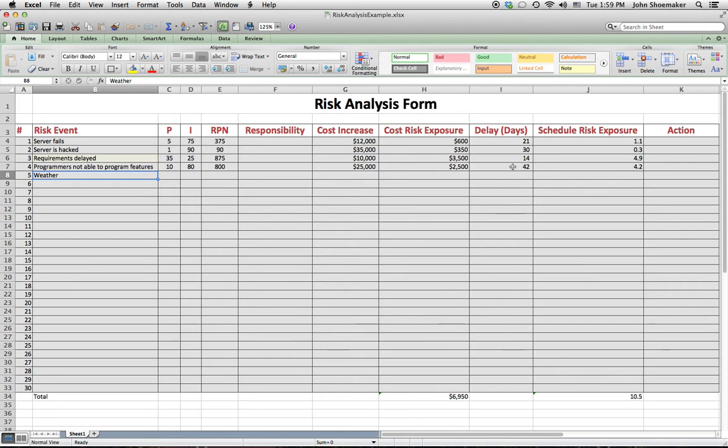We don't have $10,000 in the bank. We couldn't pay them, and this golf tournament would no longer be a money raiser, but it would be a money loser. So we couldn't afford to do that. So there is an option, and that is that we bought hole-in-one insurance. I didn't even know such things existed. But for $350, we were able to buy $10,000 worth of hole-in-one insurance.